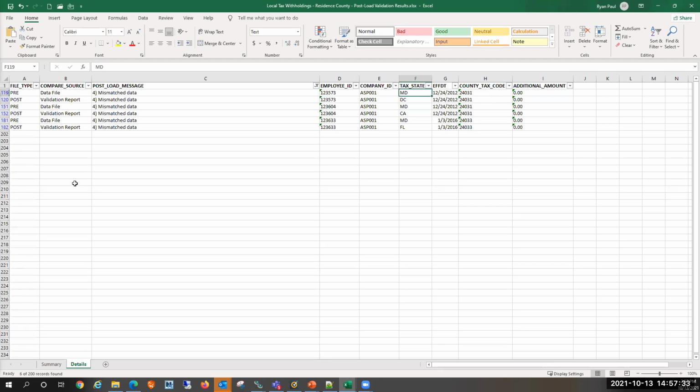Okay, how did that load just go? Was it really successful? What kind of errors do I need to deal with? And these are things that you're trying to clean up in those early builds, CNP, end to end, and probably still even a little bit in parallel, so that when you get to your go live, your hope is that you're not having mismatched data or things erroring out or people missing, right? That just didn't load at all and they're not in an error report. So what happened to them? So it's all iterative and trying to, from each build, improve on your previous one.